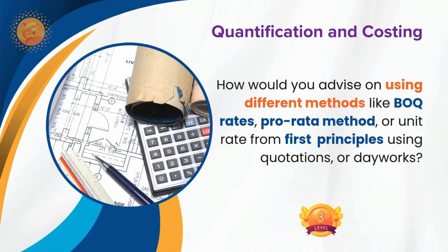Actually, if you want to evaluate the change in the project, if we have a lump sum contract, we can use first principles for estimating. If we have a remeasurement contract, you can use pro rata from existing prices, the DPU rates.